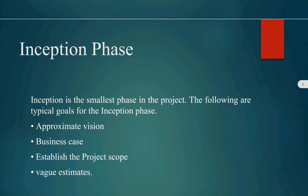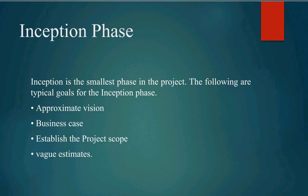The inception phase is the smallest phase in your project. The activities we do in the inception phase are: first, approximate vision is defined — what is the objective; second, business case; third, defining the scope of the project — what is the input, what is the output; and fourth, vague estimate — the rough estimate of project resources and budgets is decided in this phase.